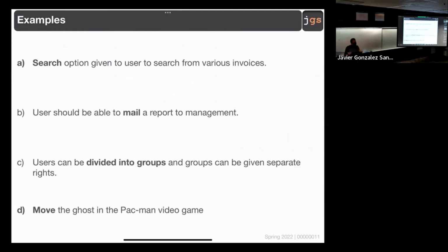We all are connected. The idea is that we are independent. It's more about, can you implement sending an email without having that thing that you are going to send by email? Can you start working on this functionality of sending emails, and later someone is going to tell you what you are going to send there?